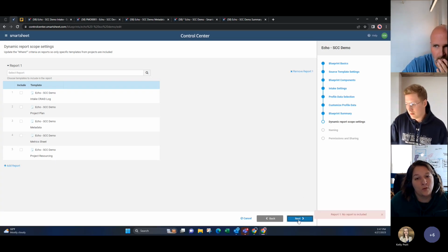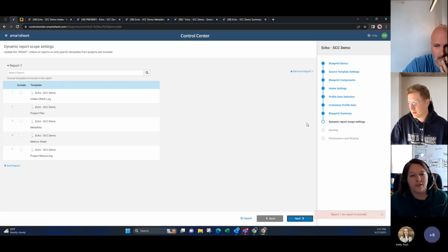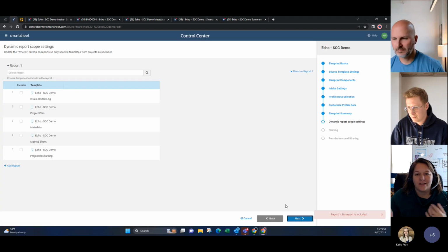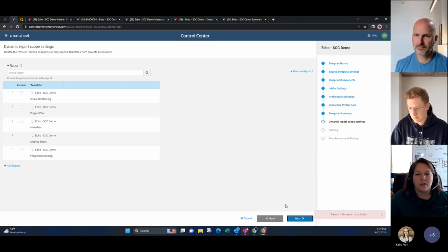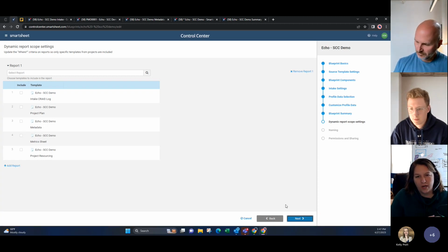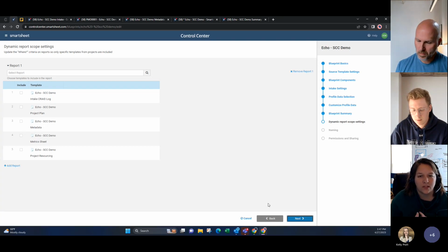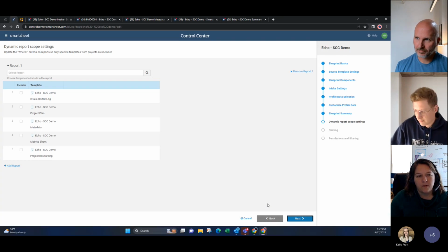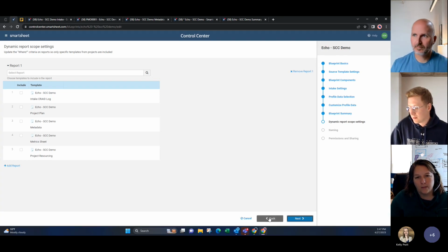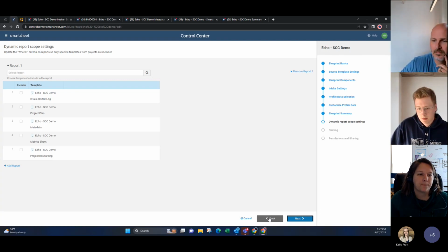So the CRADE example, we love CRADE: changes, risks, issues, actions, decisions. If we think about it, we want a decision log for an executive stakeholder. We want to be able to pull in all the CRADE sheets across all the different projects within a blueprint, and then use that filter to say, hey, we only want the ones that we want to show to the executive team or something like that. So pulling in across everything can be very, very powerful, both from a portfolio and programmatic way.